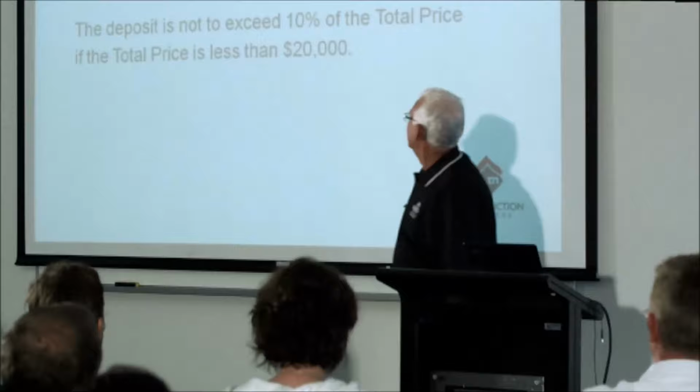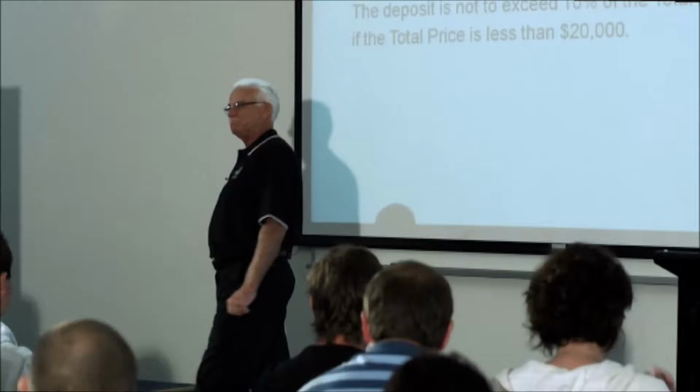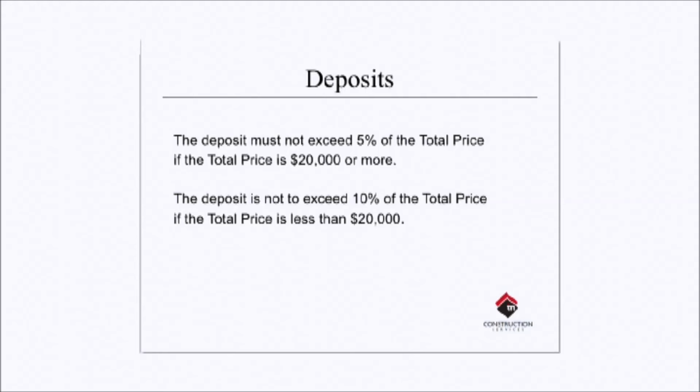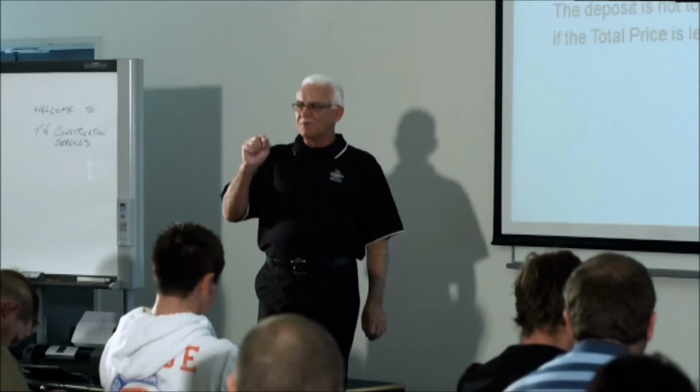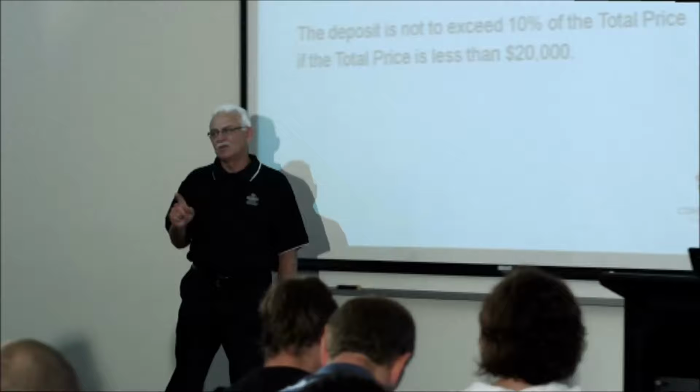When you enter into a contract, again, the law says that you're allowed to take a deposit. However, the law also says that if the contract is worth $20,000 or more, you're only allowed to take 5%. 5% of the total contract value. If the contract is worth less than $20,000, you can take 10%.